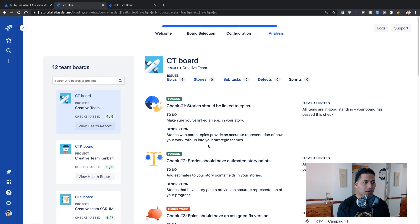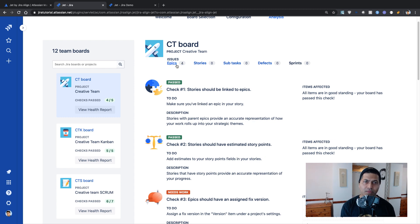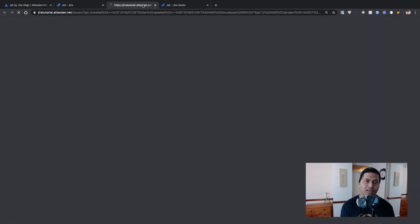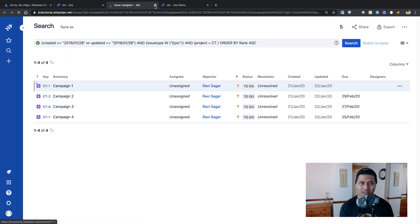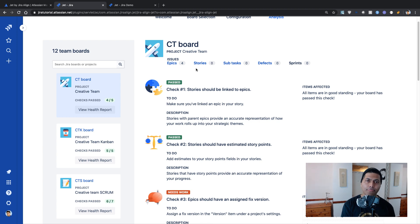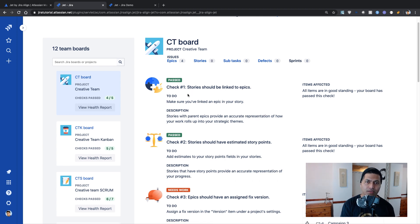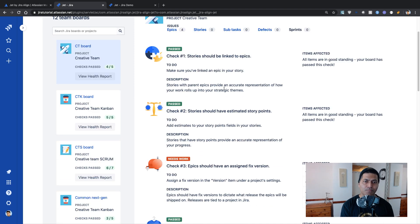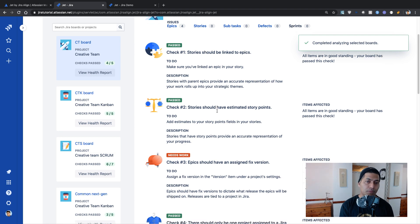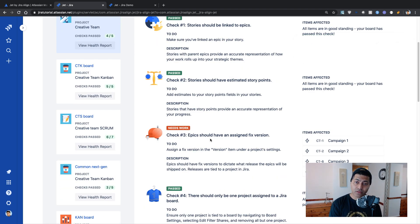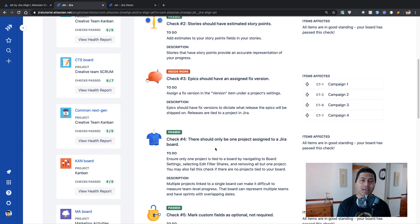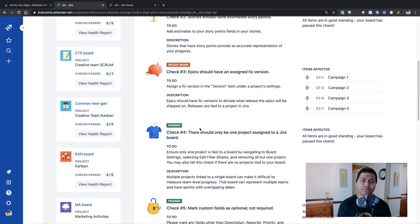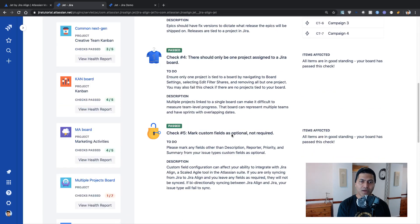So I can go through some of these checks like I have some epics, it will take me to the actual epics. So if you click on these links, you can take a look at the epics or the respective issue types. So it says the first check stories should be linked to epics pass, stories should have estimated story points pass, needs work epics should have an assigned fixed version. So you can see here on the right hand side, some of the epics are without a fixed version, and there should only be one project assigned to a Jira board, which is also pass and so on.